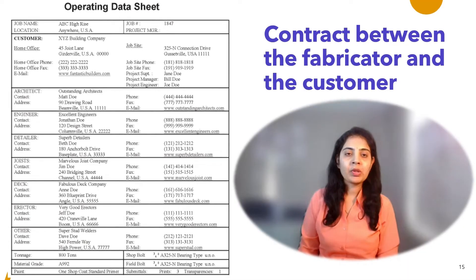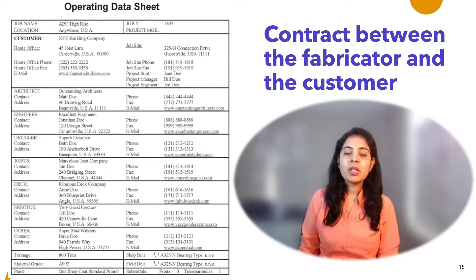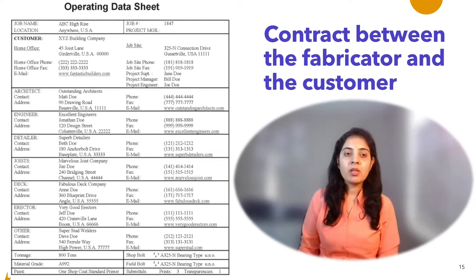In most shops the sales department prepares an operating data sheet, sometimes referred to as a job data sheet, production order, or contract memorandum, similar to the form illustrated in the figure. The arrangement and presentation of an operating data sheet will vary depending on the preference of the fabricator. The data usually includes basic information such as project name, customer, owner, structural engineer of record, architect, contract design drawings, contract specifications, location, and job number.